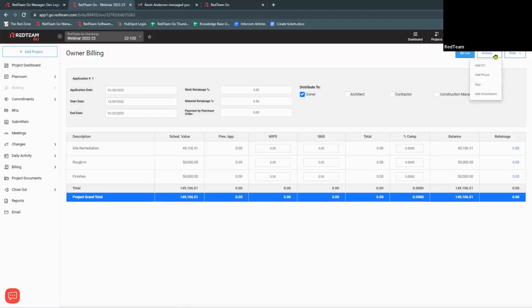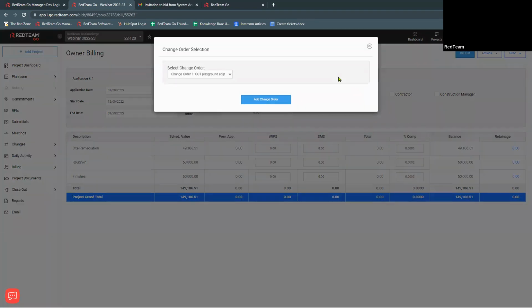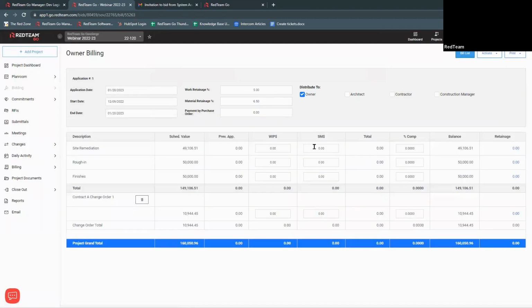We're going to pull in a change order. This is the generic, it's not the cost plus, so it's not going to add it like it would have before, or like we saw in the last example. It's going to separate this down below. We're not going to have any hyperlinks about work in place because it doesn't know how to associate those because we didn't assign any cost codes to them.